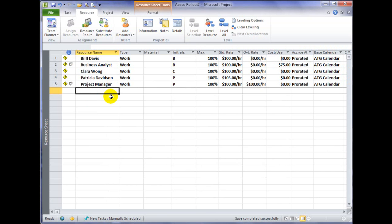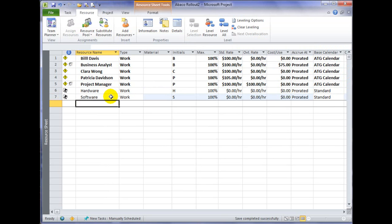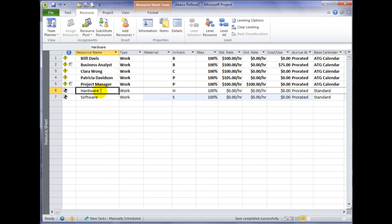An example of a cost resource would be keeping track of costs such as hardware and software. When I add a resource directly into my plan, it's considered a local resource.